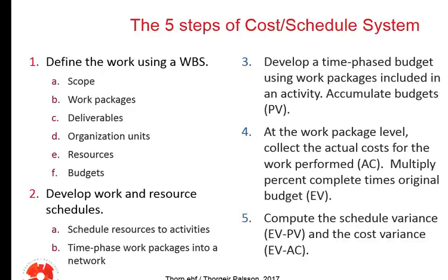Okay, the five steps of the cost and schedule system we can now summarize. First of all, you have to define, and it all starts in the work breakdown structure. You do the scope, the work packages, deliverables, organizational units, resources, budgets, everything we have gone through. This is kind of a summary of the book: the process of setting up a proper system for our project management.